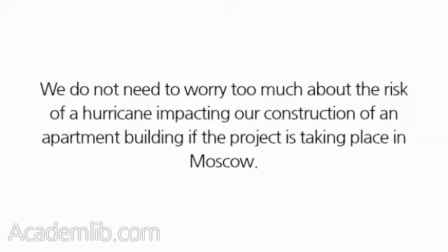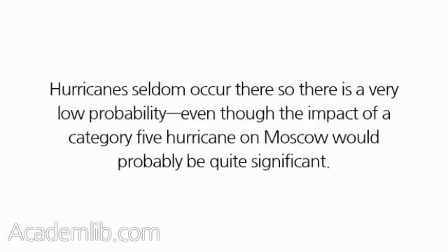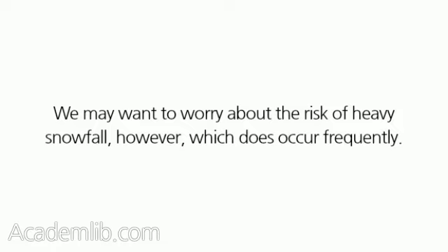We do not need to worry too much about the risk of a hurricane impacting our construction of an apartment building if the project is taking place in Moscow. Hurricanes seldom occur there, so there is a very low probability, even though the impact of a Category 5 hurricane on Moscow would probably be quite significant. We may want to worry about the risk of heavy snowfall, however, which does occur frequently.